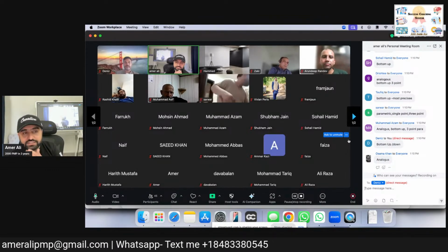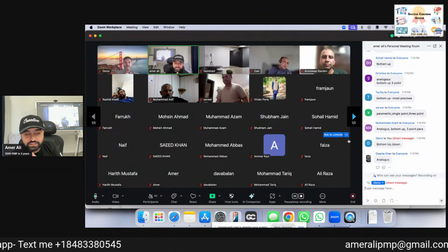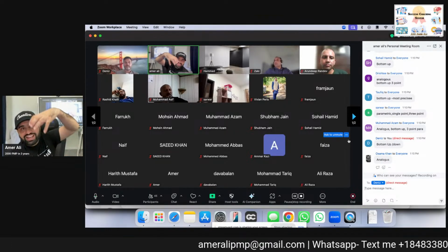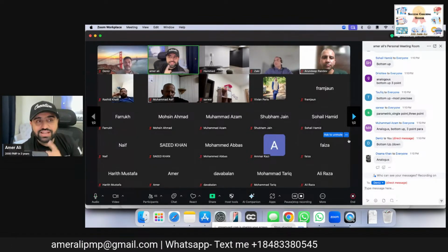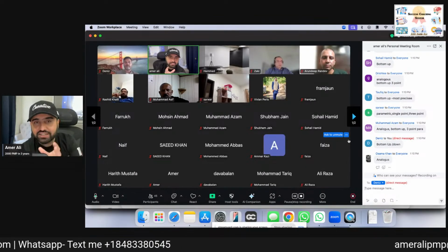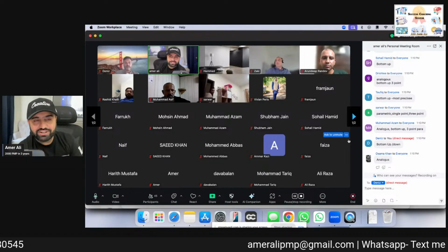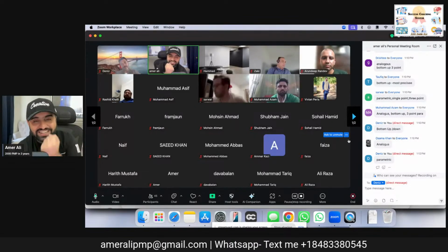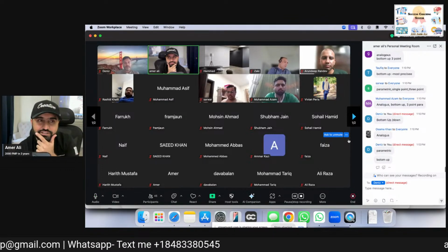All techniques are useful. But the most important thing to understand here is that if the exam says you are doing a top-down estimation or a high-level estimation, which estimation do we use? Put in the chat box. Analogous estimation. If the exam says there's a statistical relationship, which one do we use? Put in the comment. Parametric estimation. If the exam says we want a detailed and accurate one, now which is the one?